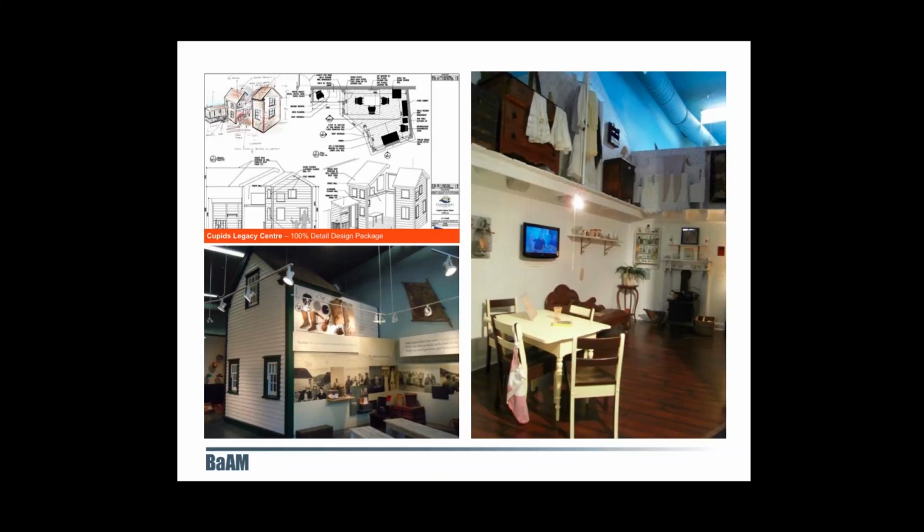During the design development stage, we often schedule design packages to be issued at regular intervals. For example, we may issue a 50% schematic package to gather comments and changes from a predetermined group of stakeholders, most likely the client. By schematic design, we're referring to a means of refining the look and feel of all design for the project, which includes graphics, finishes and materials, lighting, millwork, and so on.